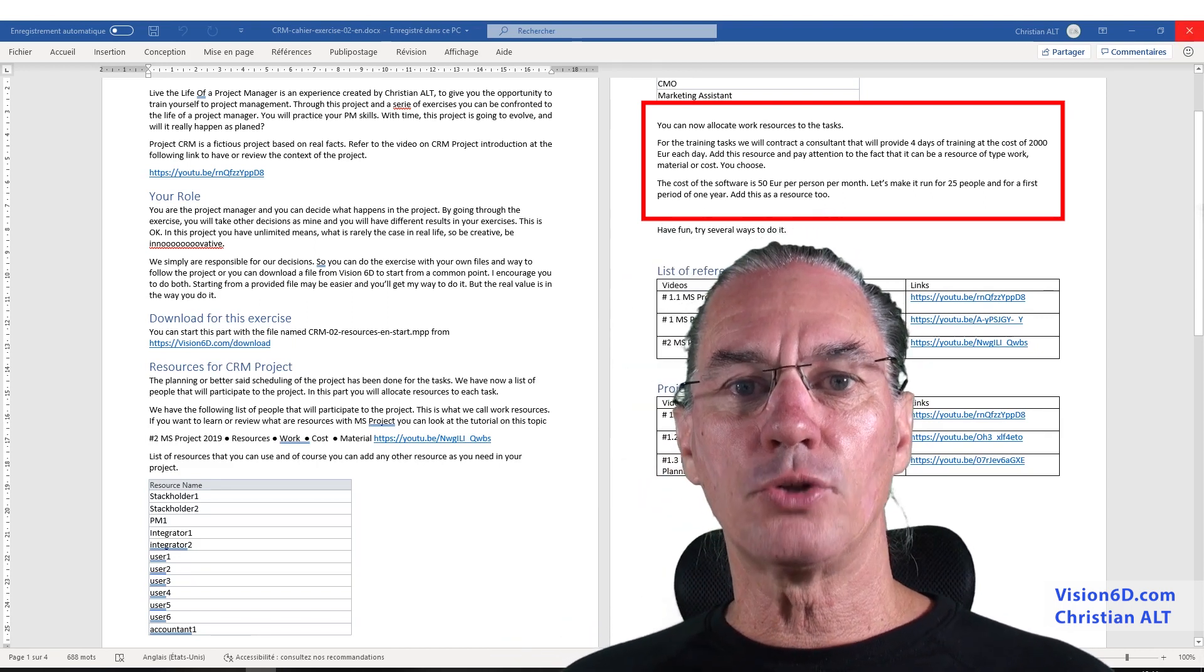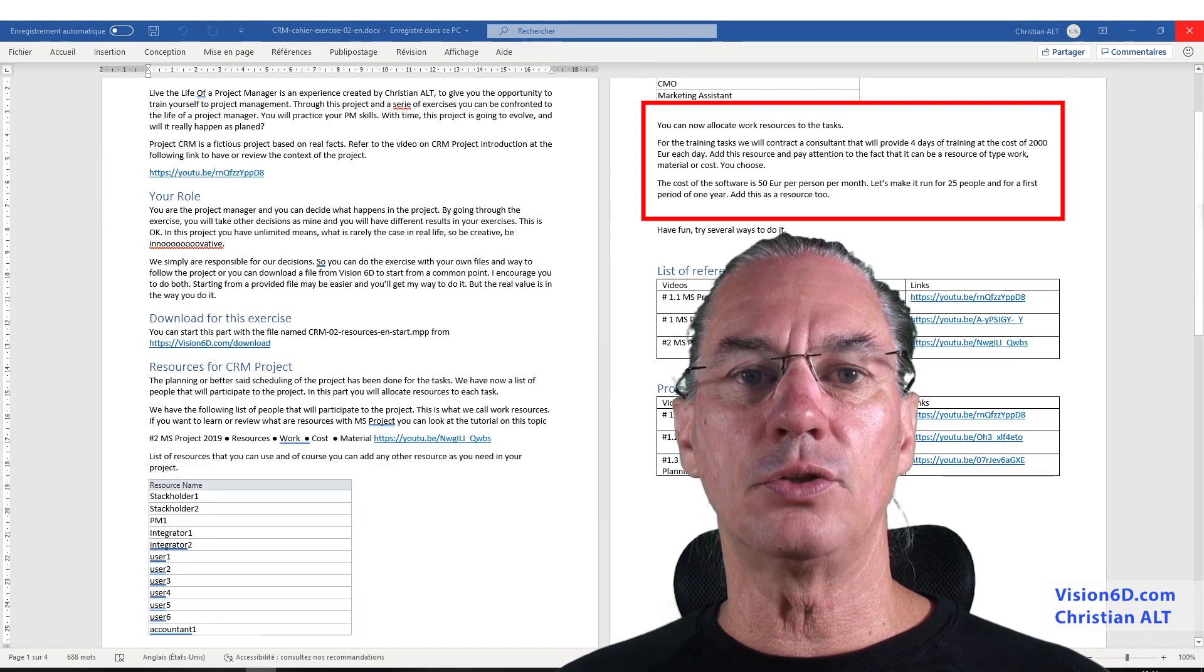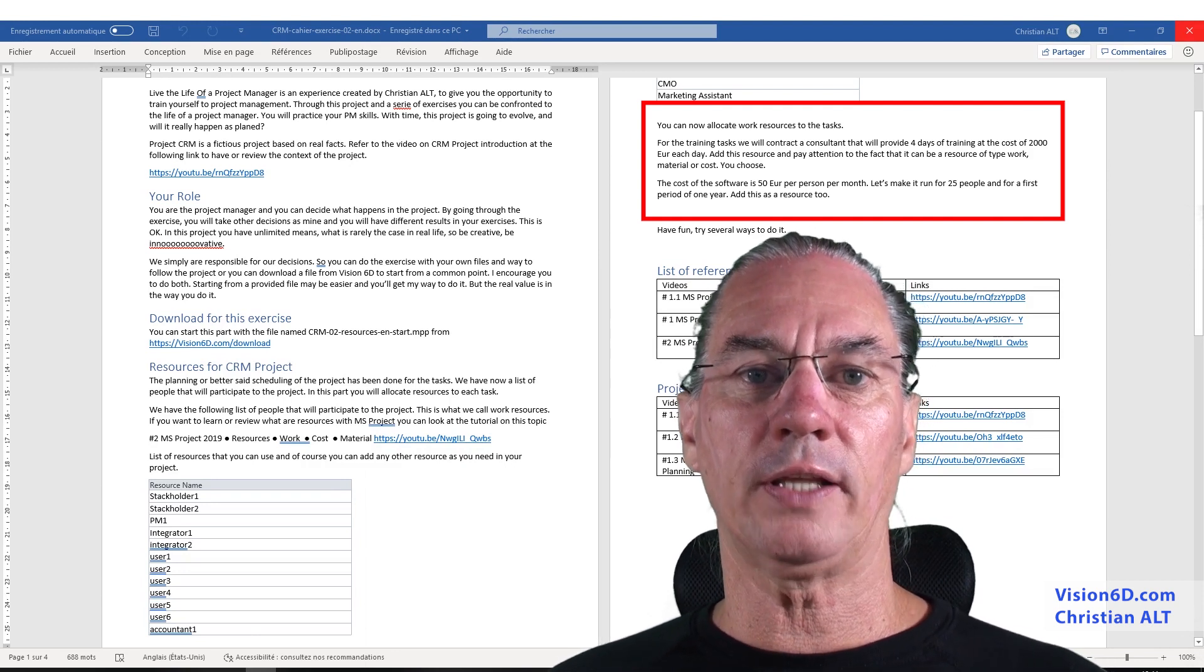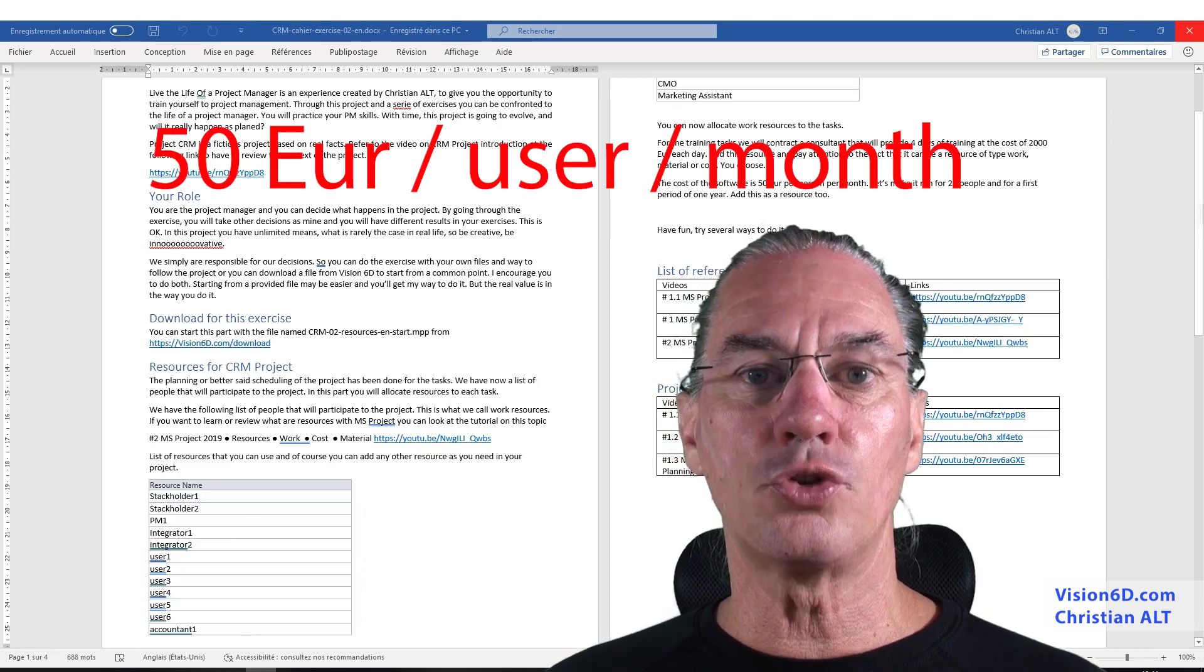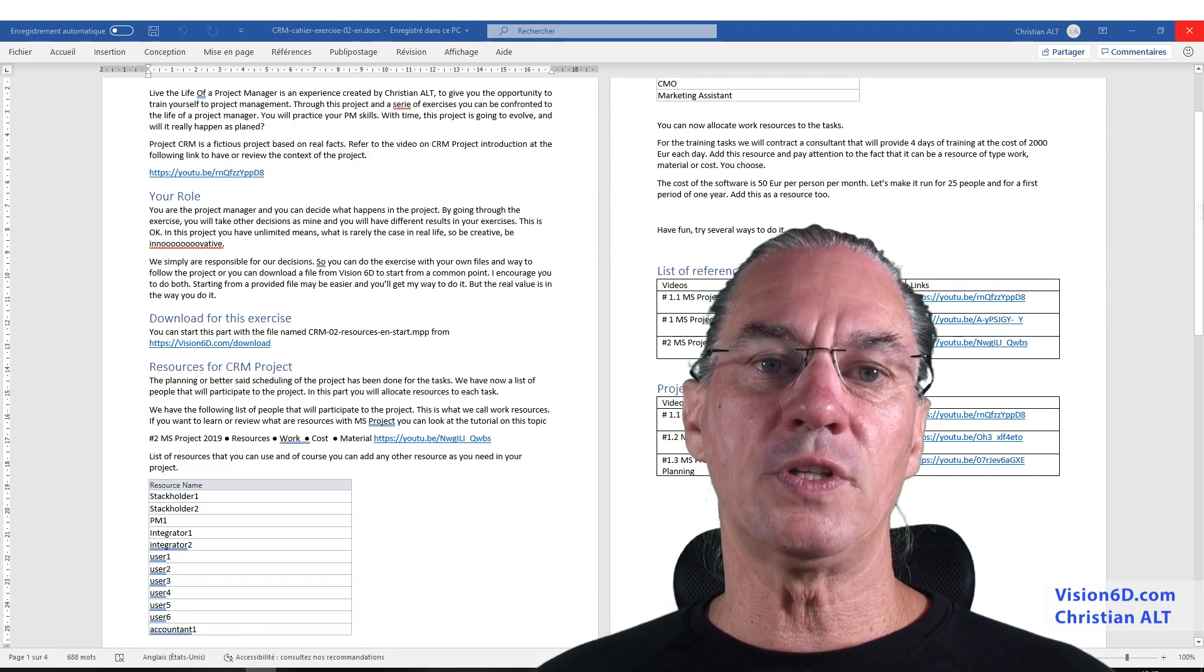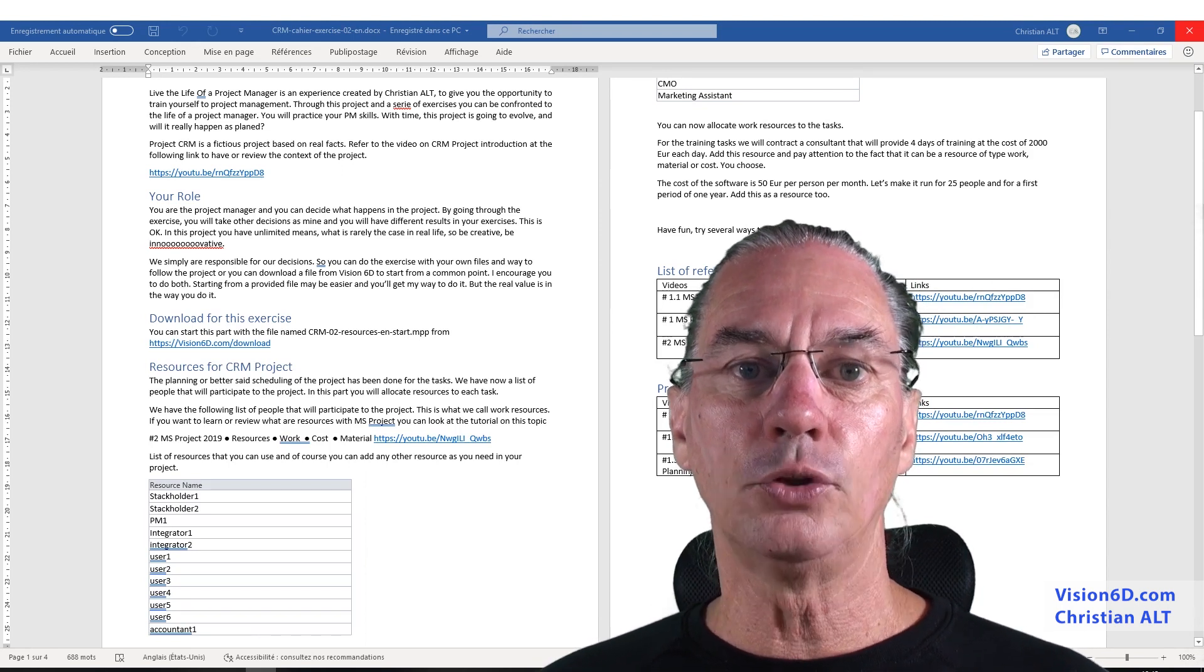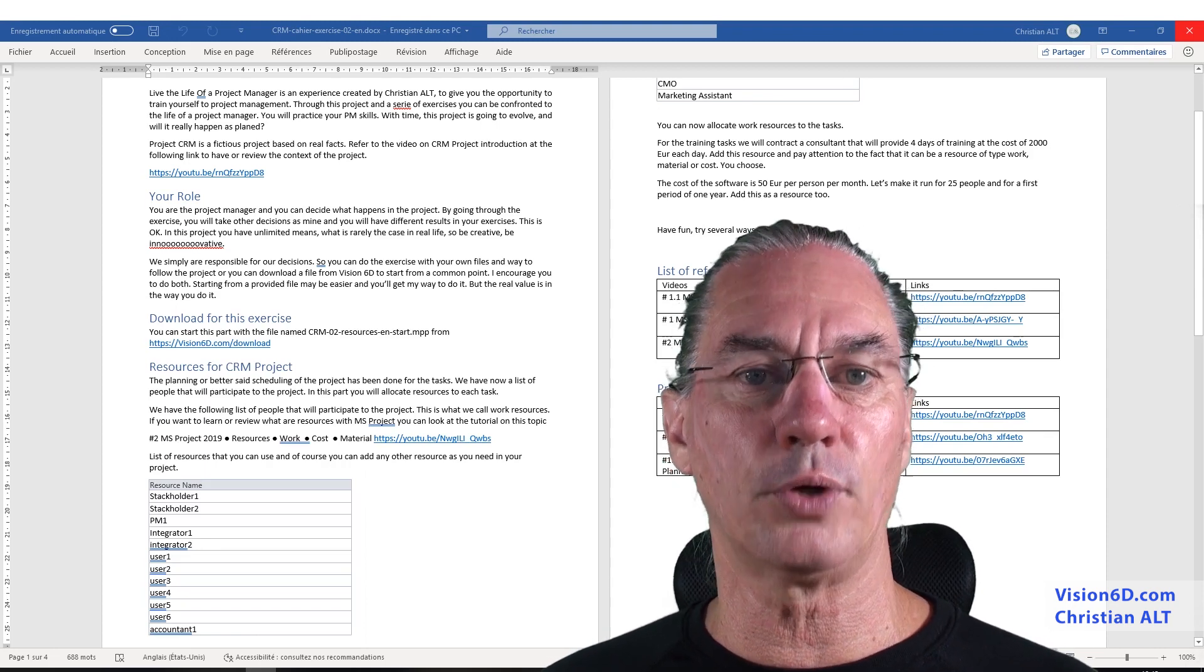In this project, we've chosen an online solution, but for this, you need to have licenses with the right to access the online software. So we estimate that about 25 people in the company will use it, and for each user, the fee is 50 euros a month. Now, we estimate that you should, for the cost in this project, for the cost of the software, do it for a time period of one year. This will be part of the project cost.